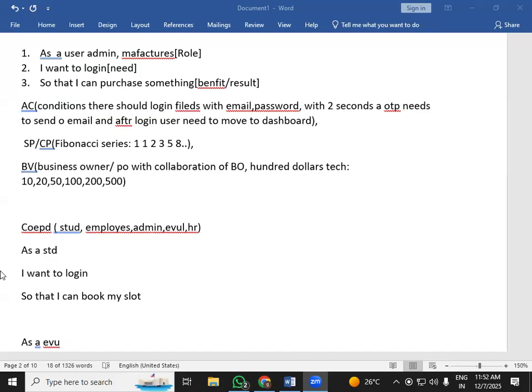Let's say there is a food ordering software, and we are the development team developing a Zomato app. For the Zomato app, the feature of a restaurant being able to register itself in the app is very important because the whole concept is food delivery. So that user story will maybe have a value of 500, and when we see that feature with the value of 500, we can understand that this feature is very important for the business in terms of revenue.